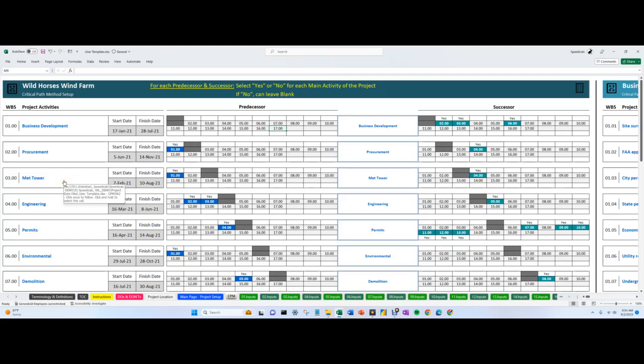So we're going out and we're going to collect data from these Met Towers, and we're going to find the best locations where we're going to put them on the land. And then we also have the environmental piece. So as you can see, if these come after, then all of those activities must have business development before it. So those match, right? So 2 has a 1, business development. 3, business development. And 6 has business development all before, right? That's a predecessor.